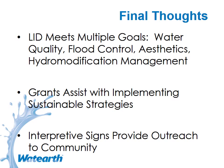I mentioned the solar structures. Once those grades were set, that was hard-coded in because they actually started building the parking structure and solar arrays probably about 75% through the design. So once that was set, we were stuck, which made the ADA path, which was nearby, very challenging to meet, but fortunately we got there.